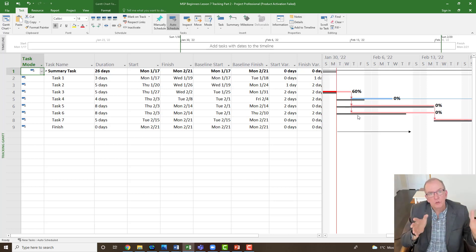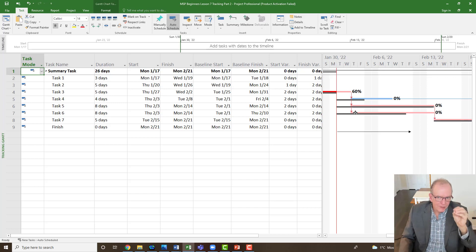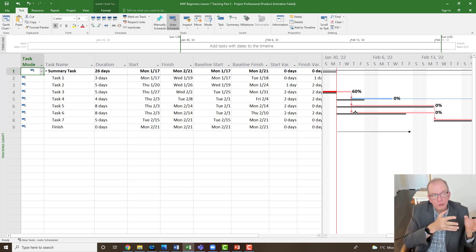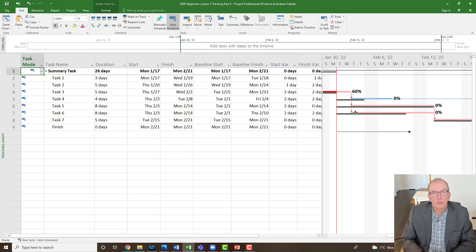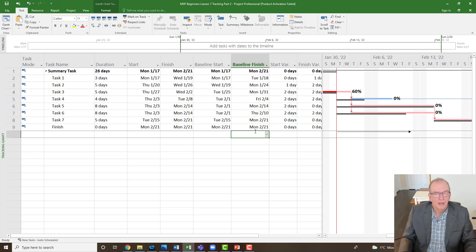This becomes the new master schedule going forward — we keep the baseline built in but now we have a new plan. Stuff's going to change again and we'll talk about that more in upcoming videos. Hopefully that gives you insight into why we update — to see delays, keep in mind costs, and get the time back. You can shorten time frames, create special calendars, or add extra hours in the resource usage view to bring in an extra resource. I'm Tom Stevenson — wishing you a wonderful day and we'll see you next time, bye for now.